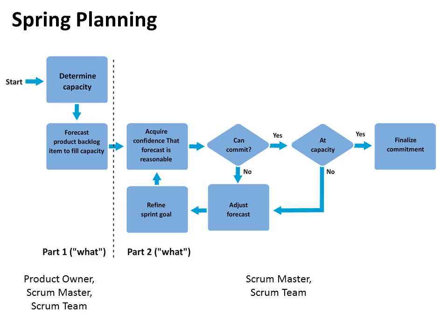During sprint planning part 2, even though the product owner is not present during the meeting, he needs to be around so that if the team has certain questions or doubts, they can reach out and clarify, or have a negotiation about probably replacing certain parts if there are too many uncertainties, and so forth.